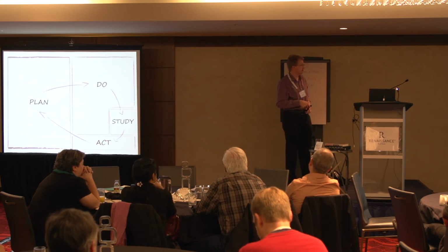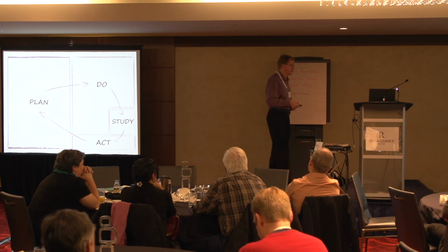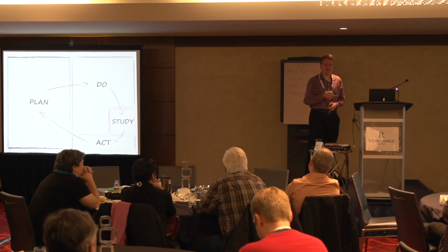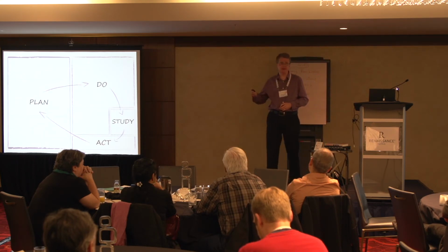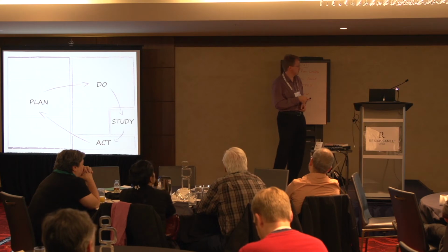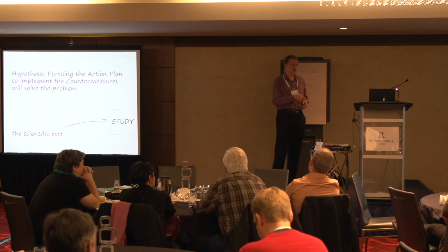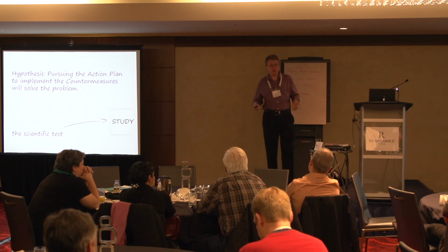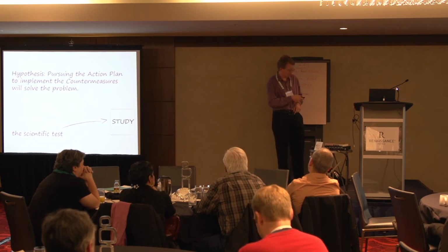And then on the A3 form, that little square tucked on the right side, the indicators, the study part, the check part, the C part of the PDCA cycle. That's the evolutionary fitness test. If you apply it, then A3 thinking works as an evolutionary improvement method. So all our planning and all the doing, that is really a hypothesis. Will this course of action actually produce improvement? And this is the scientific test.